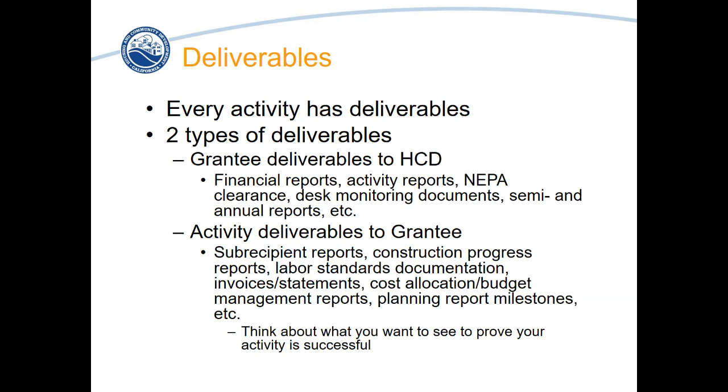But then there's your activity deliverables to the grantee. And if you're using a contractor, or if you're using an architect or an engineer as a project manager, or if you're working with a subrecipient or a consultant, these are all reports that you're going to need to collect from them. And they could include a whole list of different items like subrecipient reports, construction progress reports, labor standards documentation, invoices, statements, cost allocation, planning report milestones.